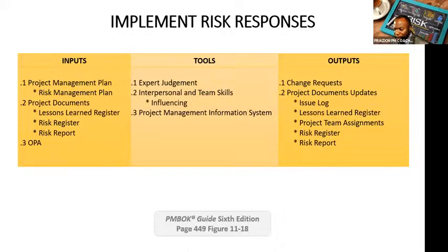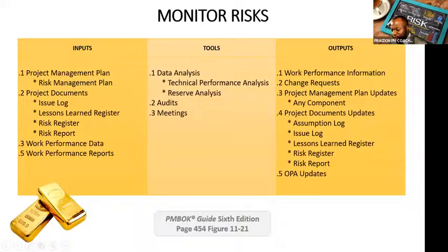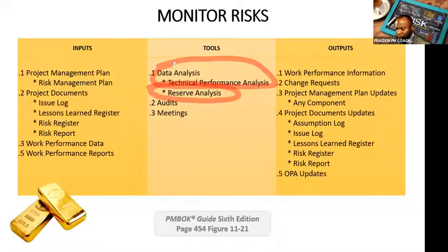Okay? And then going to our final one here, monitor risks. Monitor risks is a powerful process, folks. There's a lot of stuff going on here, but I just want to call out one, technical performance analysis. This is where you look at your technical milestones and say, did we achieve them? If you didn't get to the functionality you said you would, that is a risk, because it could keep going that way and you're late. That's a schedule risk. Reserve analysis is going to analyze whether you have enough schedule reserves, cost reserves, whatever the reserve is, within your contingencies for those tasks or activities.